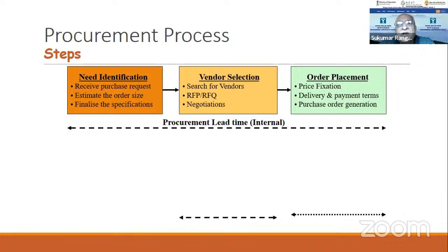And definitely in case of a purchase order, you must ensure that it is complete, because even under the Indian Contract Act or whatever, when there is a contract to buy something, it is the offer, acceptance, and consideration which are the important ones. If the offer is based on what you ask for, the more detailed your specification is in all the aspects, technical and commercial, and the party has accepted everything or accepted with deviations, then only you can take that person to task if there is any further deviation in whatever supplies. So the first responsibility is from your side to ensure that the purchase order which is generated is complete in all respects. Never mention 'same as in that previous order' and all that kind of thing. Even at the cost of repetition, it should be in detail and full.